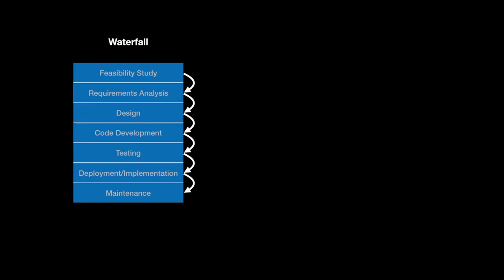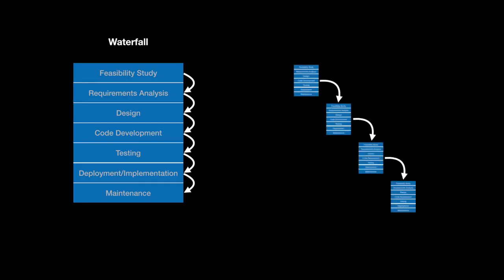So that's Waterfall, and what's wrong with it? Why would we need anything else? Let's have a look at these first 3 steps in the SDLC. What if these business requirements change during the course of a life cycle? Isn't it quite risky to do this much design up front, especially since we can't go back a stage later? Well, one way we could solve this would be to move in smaller, shorter software development life cycles, like mini waterfalls one after the other, or cascading waterfalls.